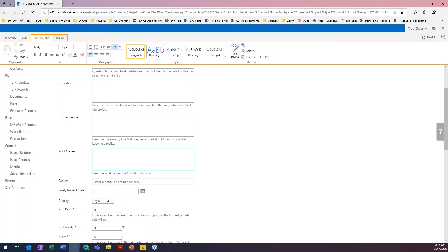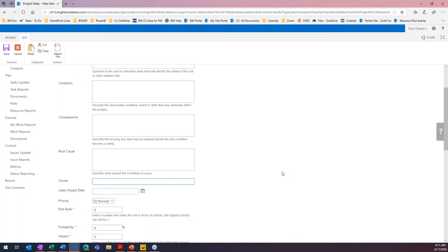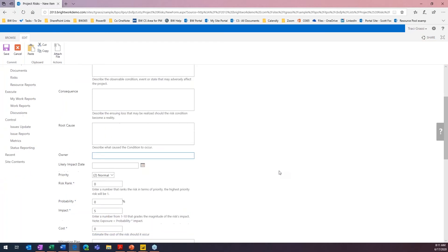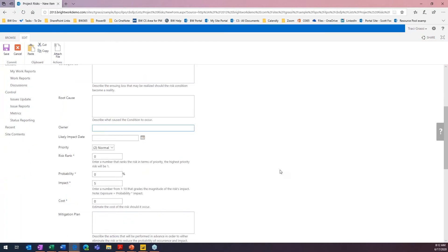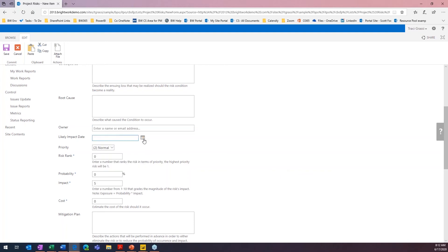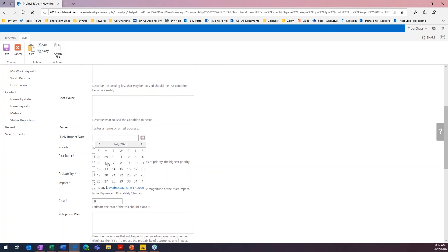The next one is the owner. Who's the owner of this risk? It's usually the project manager who is the owner of this, just because they're the ones that are going to be managing it. And then, the next one is the likely impact date. So, if this does happen, do we have a date that may come up? If we know that resource is going to be out on a specific day, then we can actually modify that and give it the date so that we can see that. So, let's just put a date in here.